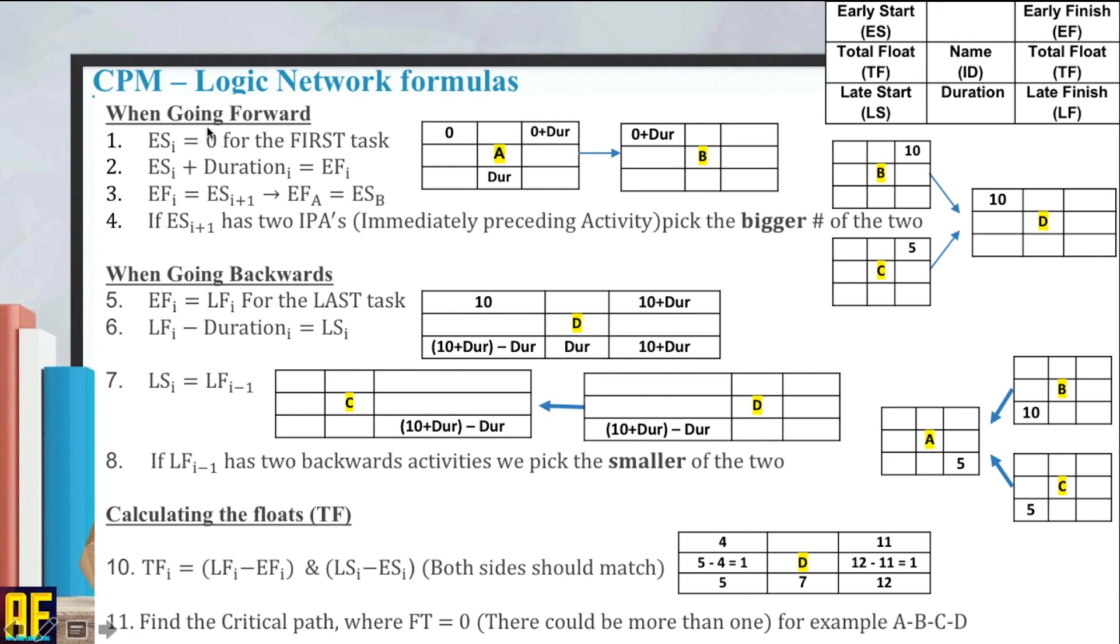Here it gets a bit messy, so stay focused. When going forward, my early start equals zero for the first task. Early start plus duration equals my early finish. Early finish equals the early start of my next activity. If my early start has two immediately preceding activities, IPAs, we pick the bigger number of the two. If I have two numbers here for my early finish, the number that I will pick for my early start is the bigger of the two when I'm going forward.